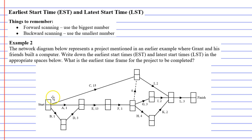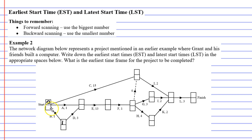We like to start at the beginning of our project, and we know that at the start, our earliest start time is going to be zero. Then following along activity B, which takes one minute to complete — activity B involves putting the CPU on the motherboard — so for our next vertex, the earliest start time is one minute, because activity D cannot start until one minute has passed, until the CPU has been put into the motherboard.